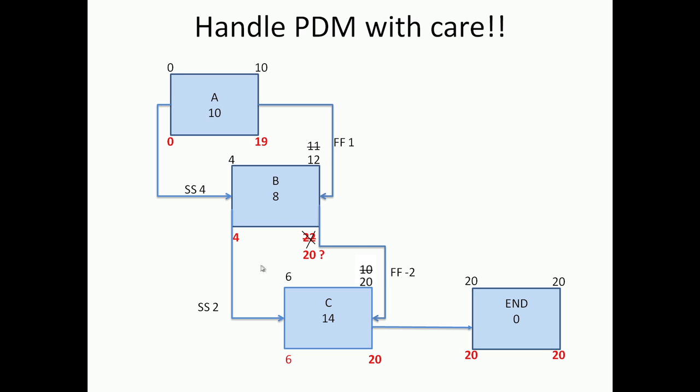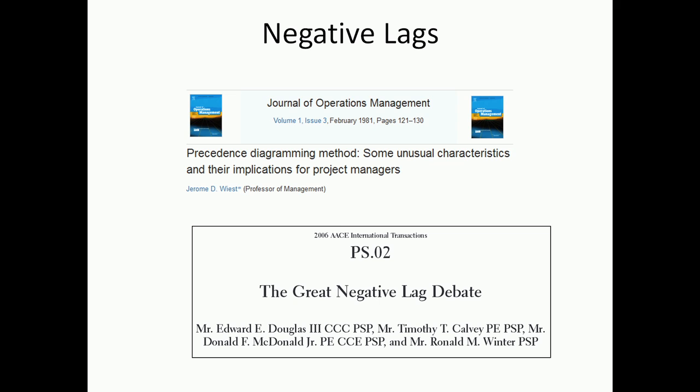This kind of issue has been discussed quite a bit in PDM literature, and this whole business of negative lags has got a lot of attention and there are many publications on this. You can see the first publication from Journal of Operations Research saying Precedence Diagramming Method some unusual characteristics and implications highlights these issues. Another publication from AACE is called the great negative lag debate. The paper talks about how some practitioners actually like to use the negative lag and are able to handle it properly. Certainly the software that is available allows you to use negative lag, but in basic analysis and for starting it is really recommended that you do not use negative lags at all.